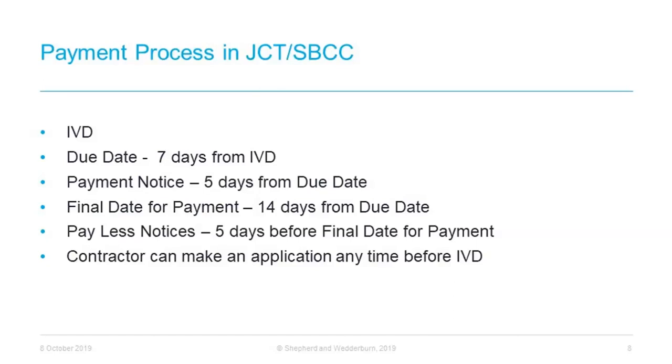Moving on now to the final certificate under JCT. A final certificate will be issued no later than 2 months after whichever of the following events occurs last: the expiry of the rectification period, the date of issue of the making good defect certificate, or the date whereby the EA or CA issues copies of the statement of ascertainment to the contractor that has to be prepared under clause 4.5.2.